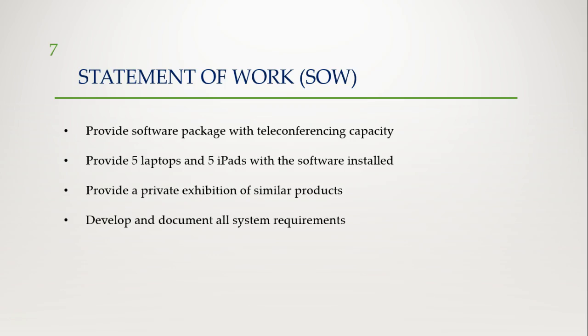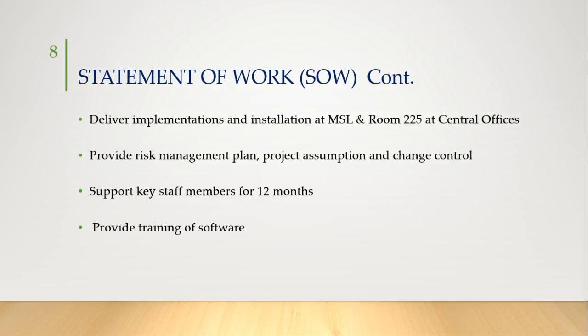Statement of work. The supplier shall provide a software package with teleconferencing capacity. The supplier shall provide 5 laptops and 5 iPads with software installed. The supplier shall provide a private exhibition of similar products. Also develop and document all system requirements.